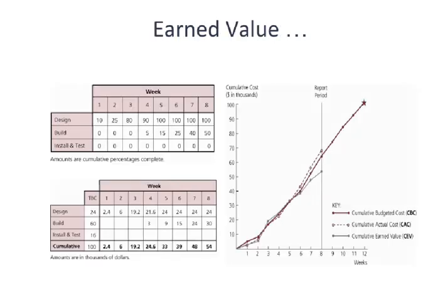The prior graph, in and of itself, would have indicated we have a slight potential problem. We are a little bit overspent at the end of week 8, but only $4,000 overspent out of a total budgeted cost for the project of $100,000. So in the big picture, that's a 4% overspend, and we still have 4 weeks left to try to take corrective steps. So the plot on the prior slide by itself, if we had just stopped there, it's not good news, but it's not horrible news.